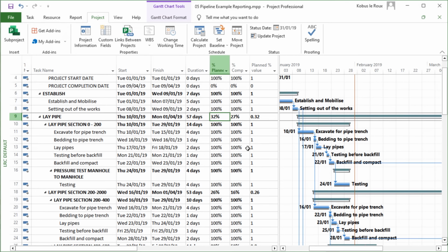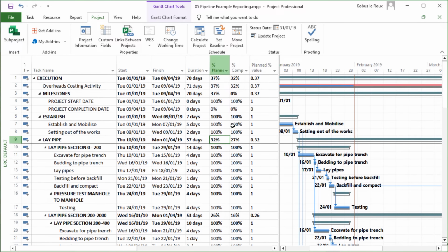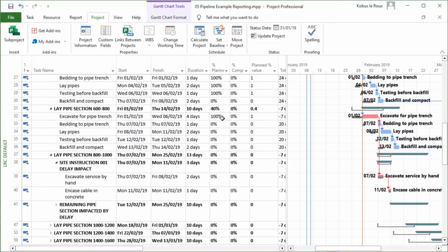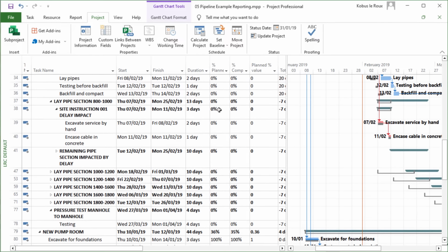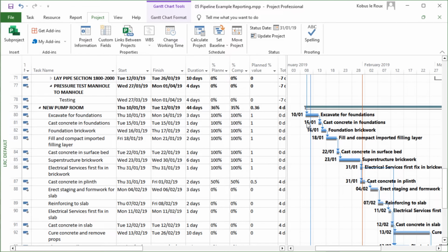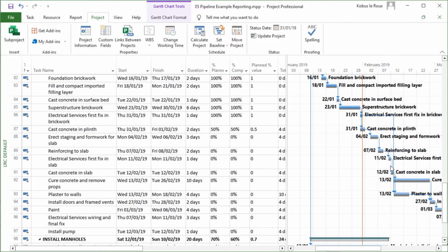Bob's your uncle. So most videos that you'll find on the internet and most blogs that I've seen will profess that this is the way in which you can do planned percentage. But there's something wrong with this formula, and I'll show you now why I say that. If we go down, it looks quite accurate. If you look at what should have been completed, it gives us the 100%, and everything that's in the future there gives us a planned percentage of 0.